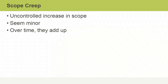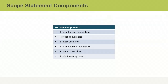By learning to recognize even the smallest variances from the original scope, you can address them and mitigate the risk that scope creep poses to a project. A Project Scope statement should have six main components. Together, these ensure everyone involved knows what falls within the project scope and form a basis for determining how to manage all remaining activities in the project's lifecycle.